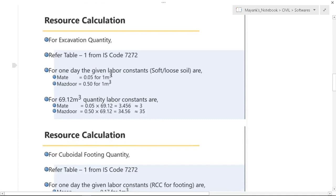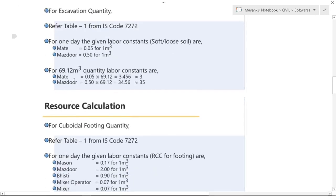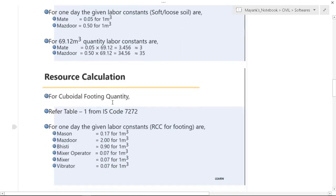For calculating the resources we have used IS code 7272 table 1. The given labor constants are for 1 meter cube. So for 69.12 meter cube quantity, labor for the excavation work has been found out to be 3, and Mazdoor has been 35.